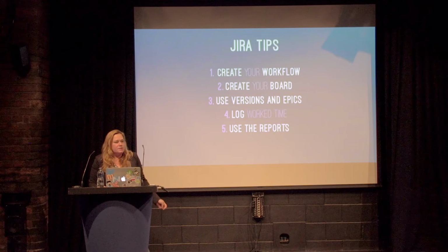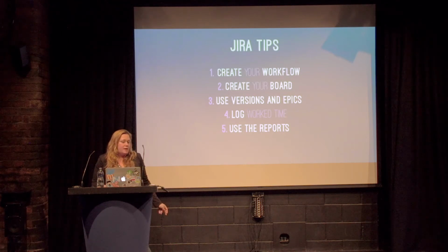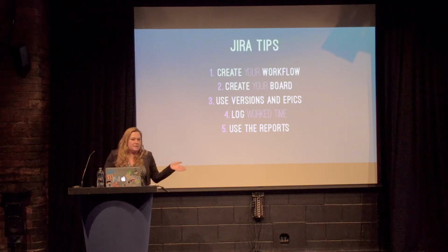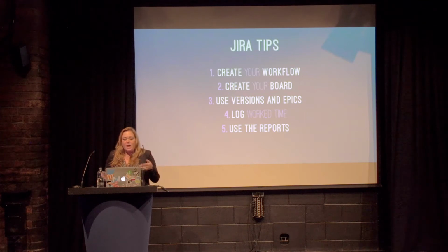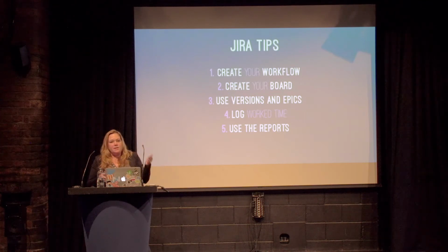And it's very important to log the worked time. So if we're going through all this trouble to estimate our tickets, we have to log the worked time so that we can see for each ticket the estimated time versus the work time. And we can learn how our estimating is doing. Are we under or are we over? And then also we can use that for reports.